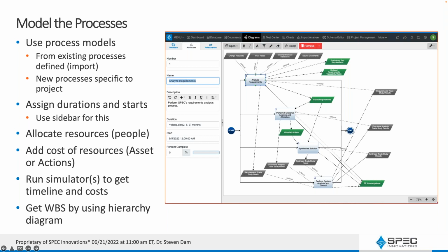In fact, on one contract recently, I would take a snapshot from that database view to show where we were in status of deliverables every month. So again, there are nice ways you can use this to communicate with your customer.